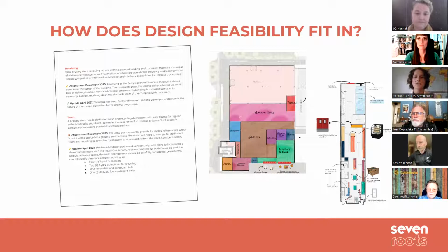So it naturally includes early design work, because you're testing the site and identifying the rough square footage you'll need for each department to meet your sales projections. Feasibility often entails the first two phases of design. You basically want to do enough to get the information you need to secure your site, but not pay for anything beyond that until you're locked in, because you don't want to get ahead of yourselves in terms of investment.